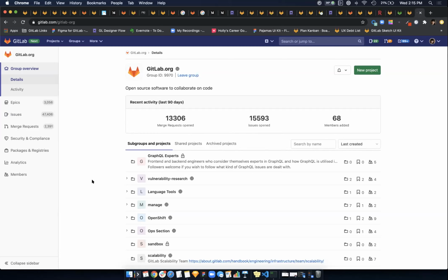The way that we're building iterations in the product is a time box. It is literally like a fixed period of weeks, 1 or 2 weeks. You could also look at the way that that's been broken out as what's the next chunk of business value, which is a sub epic, right? That has here's the features we want to build that may or may not all get completed within a given time period. So that's where we should drive towards more clarity between how you use epics to manage scope, and then how you use time boxes to tell you what scope you can get done in a given time period.